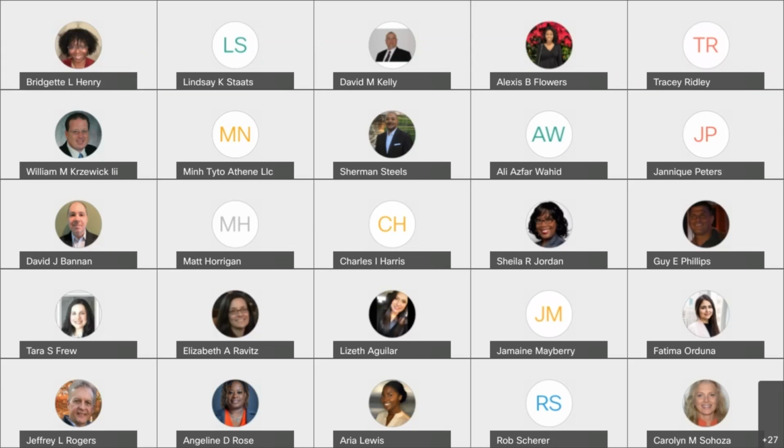Okay. Next question. What are examples of tacit knowledge? Here are your choices: beliefs, experience, and insights; words, numbers, and pictures; anything of value to another person; or only knowledge about the project scope, schedule, and budget. What is the best example here of tacit knowledge? Beliefs, experience, and insights. Thank you very much. That is correct.